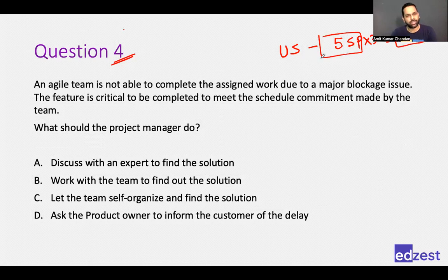Out of these 3 user stories, if you did only 2 and the 3rd user story was 90% complete, then for the 2 user stories completed 100%, you will say 5 story points each were achieved. But the 3rd story was only 90% complete, which means it is not fully complete. If it is not fully complete, you will not be able to use it. It will not deliver any value. And hence for the 3rd user story, you will say that our score is 0.